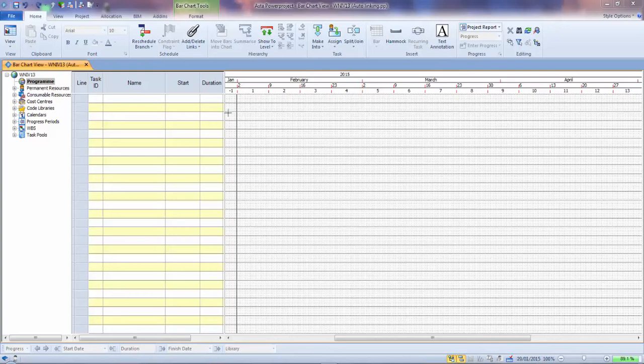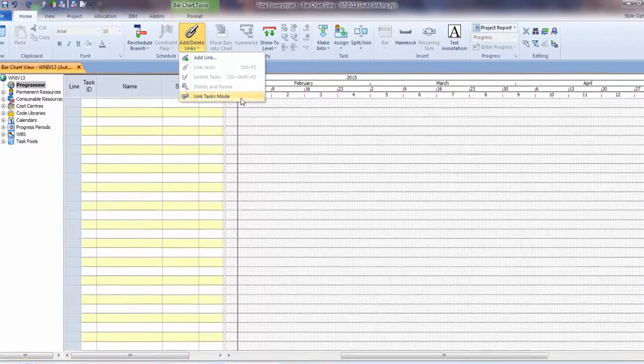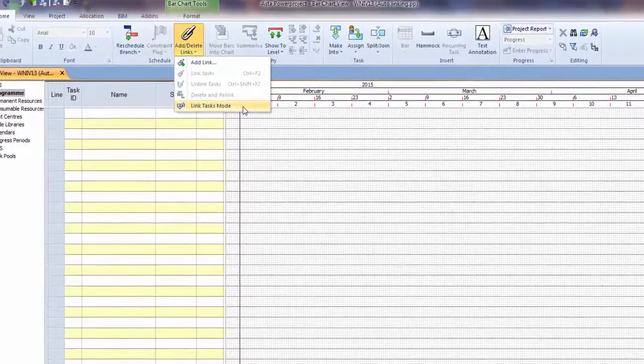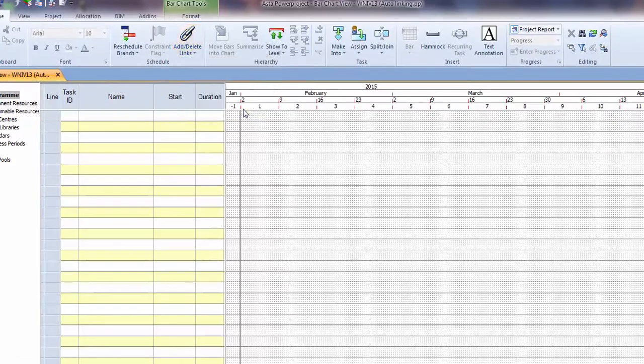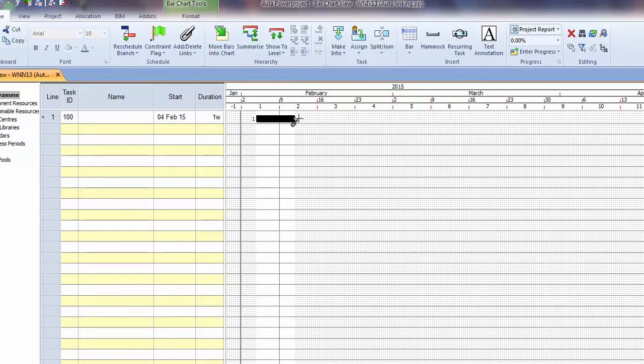Okay, this is version 13, the new feature of being able to link and create tasks in the same action. You have to take this menu option and then we're in the link task creation mode. So we can create an activity on the body of the bar chart by drawing.